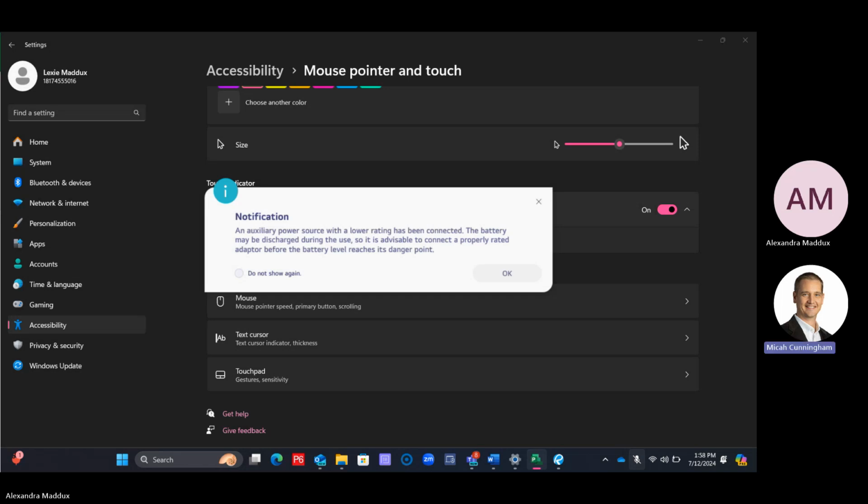So if your buildings are the same, you can actually collapse the entire building, copy, and then paste your entire building. So you'll keep everything tied in. If you are going to do that, you'd want to tie everything within your building together under that subheading, but it will take external ties with it. So say they're following some sort of site work or rough grading, it's going to keep that logic tie with it. So you just want to make sure that you don't have anything tied to external links that you don't want to carry over. Does that make sense?